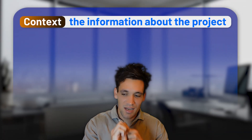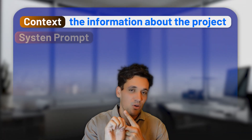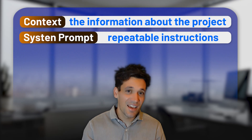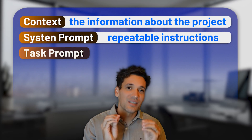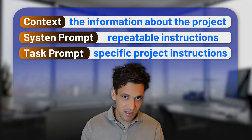This isn't some complex coding project. It's a very simple, straightforward setup where it's going to help you produce an AI tool where you can upload your tender documents and bill of quantities, and using a series of prompts and system prompts, output that into a structured Excel estimate. There are going to be three key components: the context — the information it needs to do the task — a system prompt with repeatable instructions the AI agent will follow, and a task prompt with specific instructions on how to prepare the estimate.